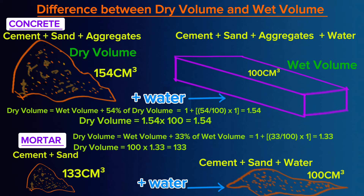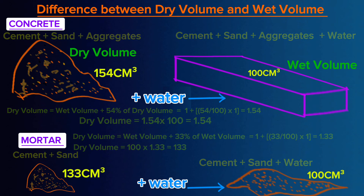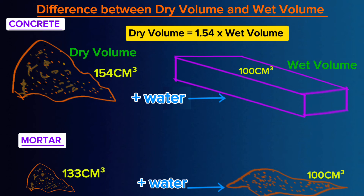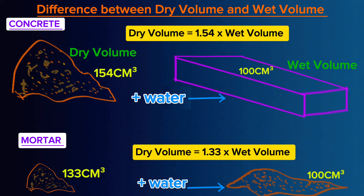In summary, when water is added to a concrete mixture of sand, cement and aggregates, the volume reduces by 54%, whereas when you add water to a dry mix of cement and sand, the volume reduces by 33%. When you want to convert wet volume concrete into dry volume, simply multiply wet volume by 1.54 — 1.54 is a constant. Similarly, when you want to convert wet volume mortar into dry volume, simply multiply wet volume mortar by 1.33 to get the dry volume mortar. Use 1.33 as a constant.